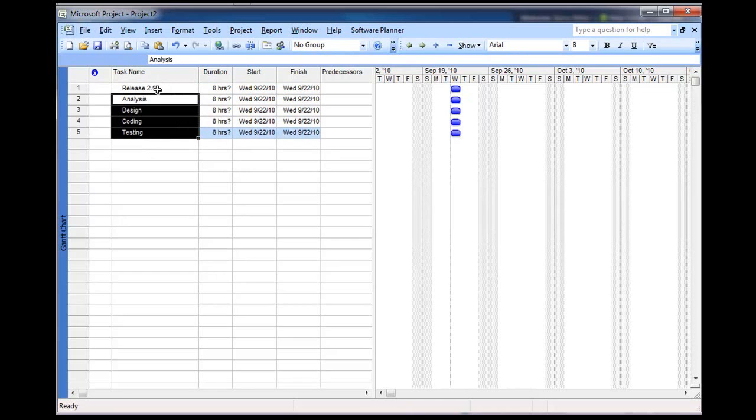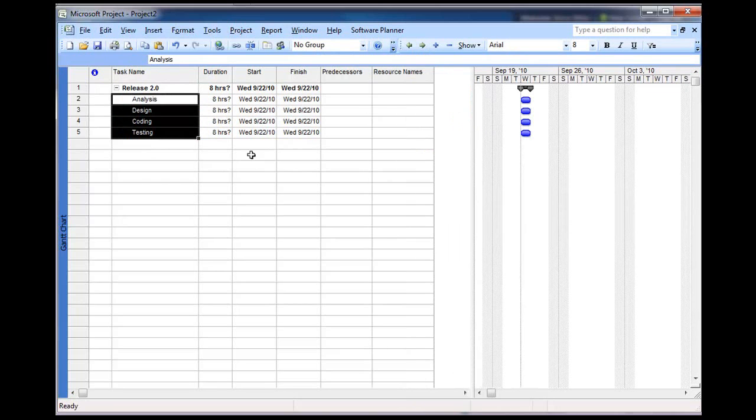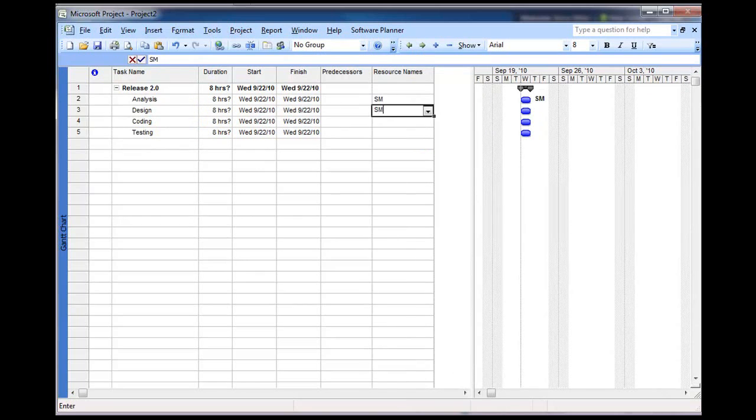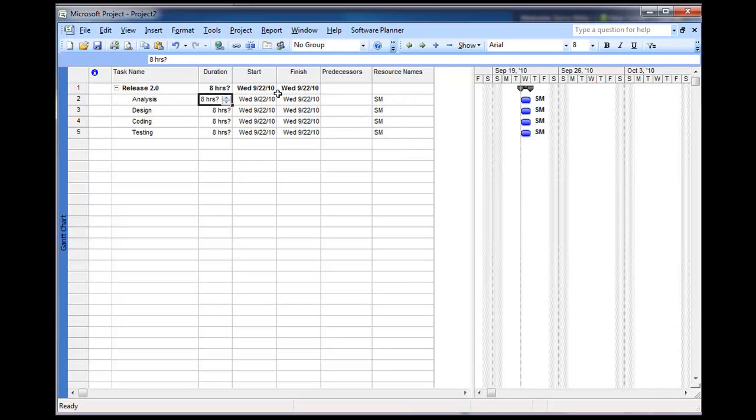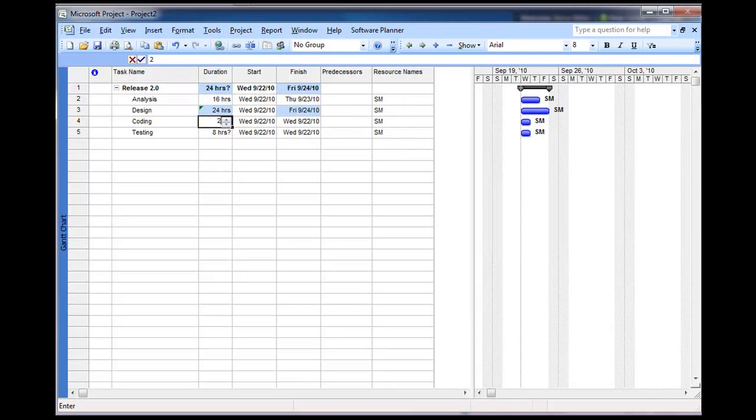So, we want to indent all of these using Microsoft Project. All right, and then we also want to assign it to somebody. Let's say I want to assign this to SM for Steve Miller. Okay, and let's say that we also wanted to place estimates on here. 16 hours of work for analysis, 24 for design, 24 for coding, and 12 for testing.